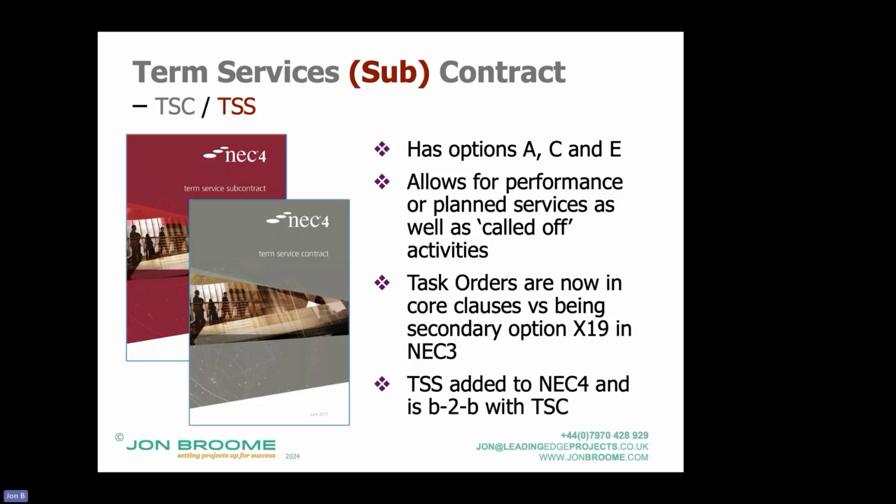But it also allows for task orders, and task orders are, if you like, originally the idea was they're minor improvements. So for instance, in that area, despite you cleaning the drains once a year, and another time when we instruct you, it keeps on flooding. So actually the drains aren't adequate. So rather than go to an external contractor, we will go to you directly and instruct you to do the improvement works on that, without going to another contractor.